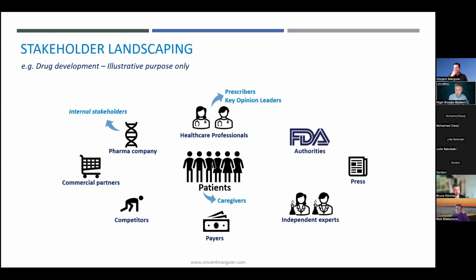So once the project scope is outlined, identifying the stakeholders is to me the next most important activity, as it provides some of the context and environments the project team will evolve in. There are several ways to do so. What I usually do is to map out some assumptions like you see on the screen and discuss them with the project team during a kickoff meeting to trigger additional thoughts. Again, I find it more effective to provide something, even if it is wrong, rather than nothing at all. And I tend to place the end user in the middle to make sure the team keeps the focus on this main stakeholder.